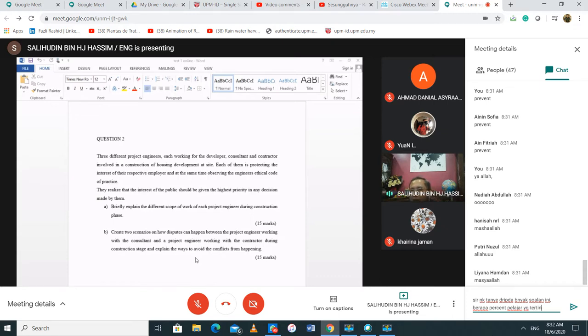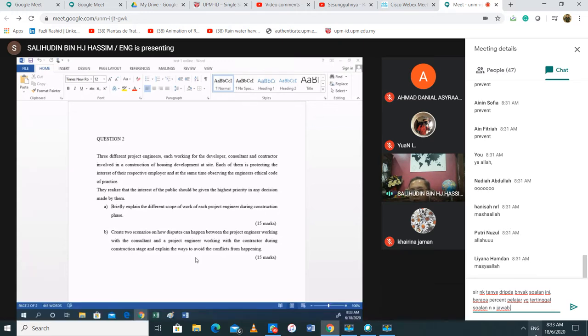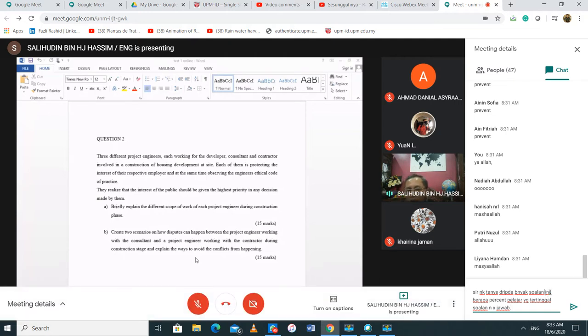You must explain, if it is discrepancy of drawing, you must quickly check which drawing takes precedence. If you follow the architect, they have a problem with the engineer. Check with the designer and settle it, for example, do it fast. Delay in inspection: you must give them the right schedule, or they must give you enough notice, so that you can come on the spot and you don't delay. Quality control: you must immediately approve or disapprove, don't wait. For example, you reject the column once you are done with the third floor. You should reject there and then. Things like that. This is how to avoid.